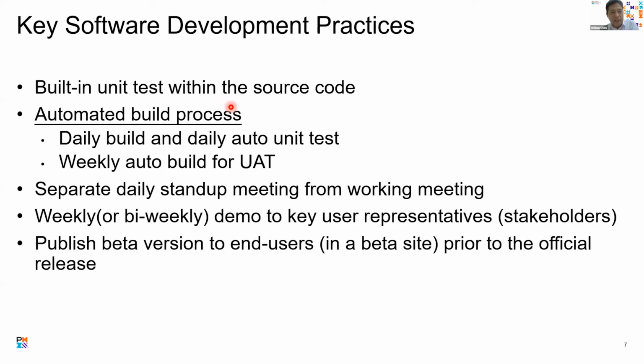A few things to remind everyone here. When we do the stand-up meeting, remember it's a quick meeting. Normally for us, it's 10 to 15 minutes. If there are a lot of things to discuss, we always separate them into different working meetings. Also, when it's said to be done by everyone, we still need to demonstrate to some user representatives or our customer representatives. So this is truly done.